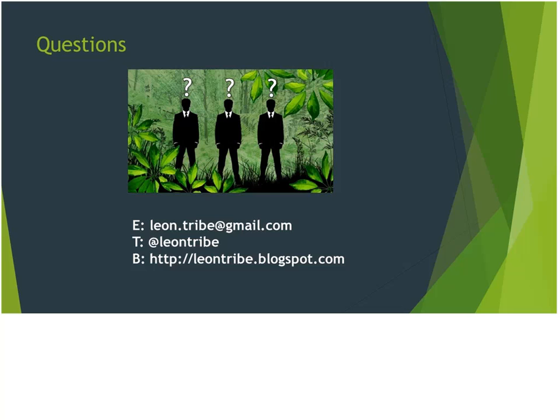You can have a whole structure, or a whole flow, of status and status reasons within the system. Again, I haven't played with those. I've left them as they are for this project, but you can modify those to suit your project. If you've got a specific flow that you want to impose upon TFS, it can be done apparently. Yes, you can gain visibility for reporting on how far you have progressed with, say, a development module. You can then, at a higher level, get an idea of how progressed you are with all the modules for a project. And the key way to do it is both those status and the reason fields.